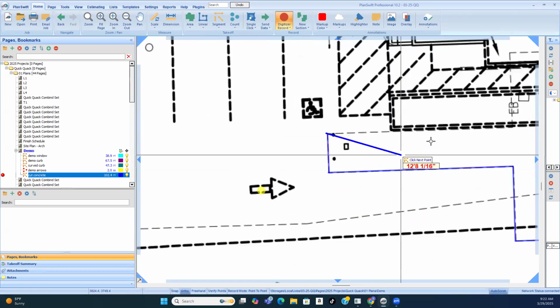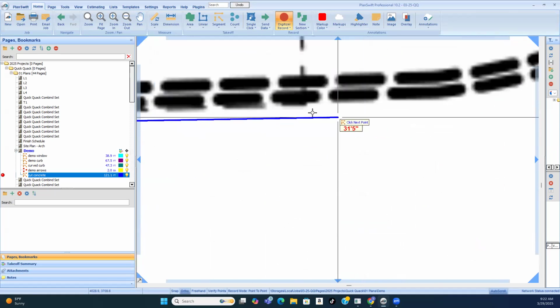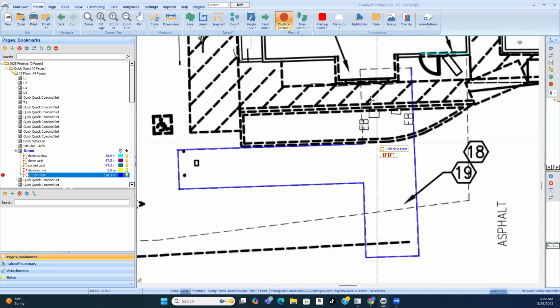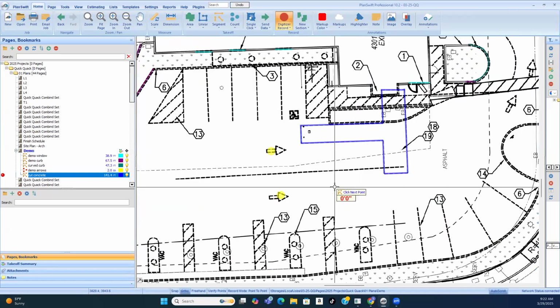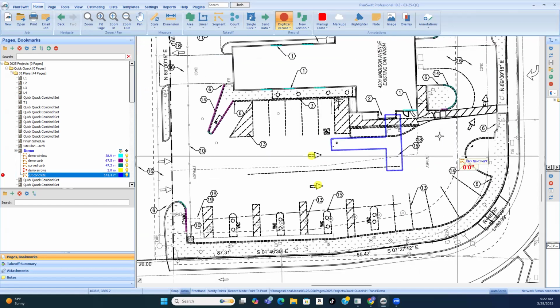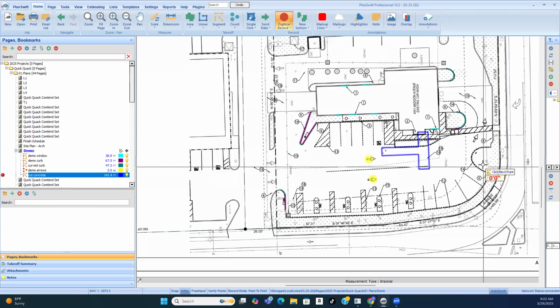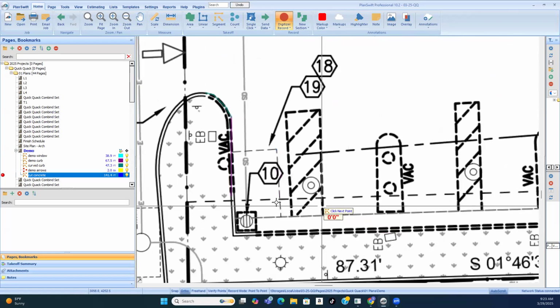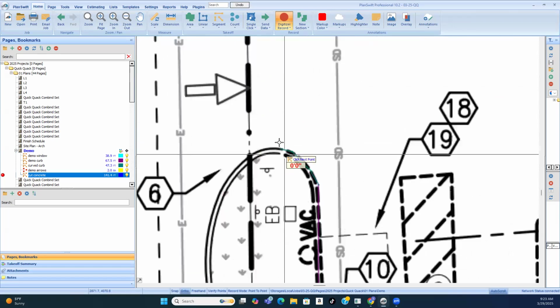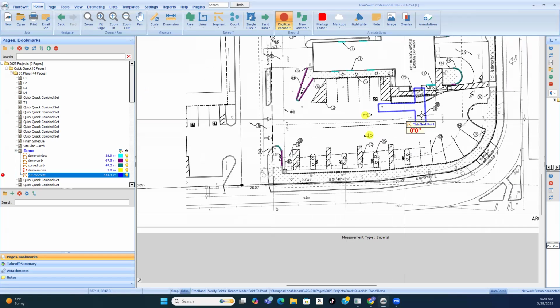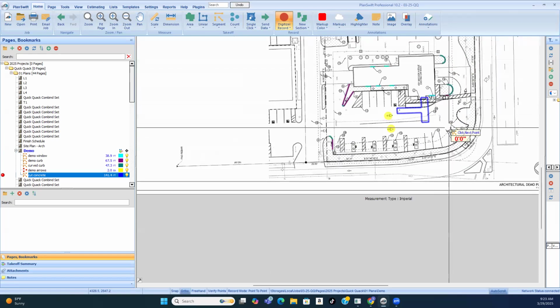Okay, so this, I'm assuming, because we don't see. Oh, yeah, we do. We see it. See, bam, right there. So the first cost of doing concrete is the cutting. How are you going to do a water cut? You've got to make sure we don't have silica dust all in the air. So that's one thing. Now let me see what we got going on here, because if nothing is pointing to that, I'm not assuming we're cutting out all of this too, all the way up. I don't think so.